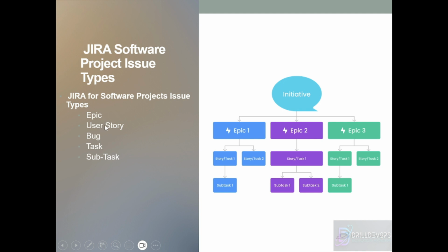User stories can be divided again into tasks: task 1, task 2, task 3, like that. I'll show you. An epic is a combination of multiple user stories, or a big requirement, and we assign the stories to multiple developers or DevOps or QA team, whoever that particular Scrum project belongs to.